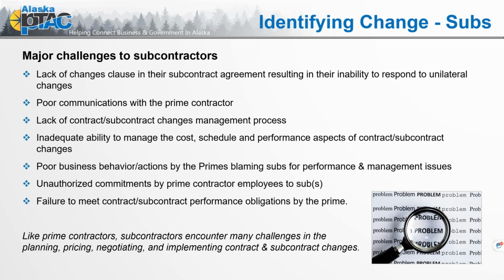If the majority of your government projects involve you as a subcontractor, think about these major challenges, and negotiate to have a changes clause in your subcontract so that you have the ability to address the impact of changes as they're flowed down from the agency.